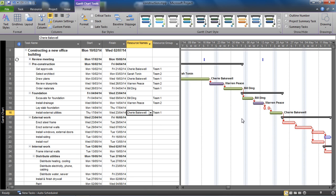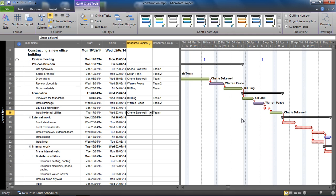You can use this same technique for changing color of bars for anything you wish. You can change the color of the bar if the task is running behind schedule. You can make it dependent on location, dependent on resource, and there's so much you could do. If it's got a deadline, if it's missing the deadline, it's all about setting up them flag fields and the formula and then you just create the bar styles off the back of that. But really it's all about them flag fields.